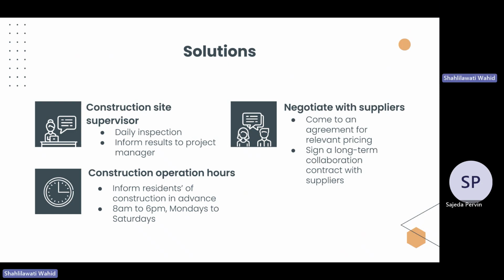And before the start of our construction, we will be announcing the operation of our upcoming project by posting up posters around the area, informing residents of the project. And we will also follow the construction time set by the government, which is from 8 a.m. to 6 p.m. on Monday to Saturday.